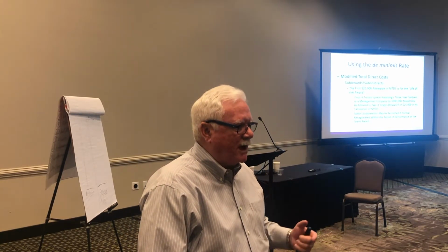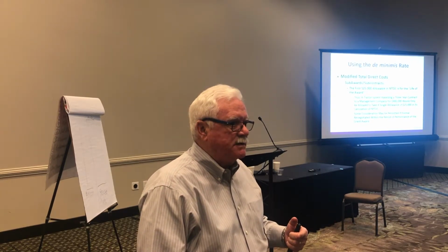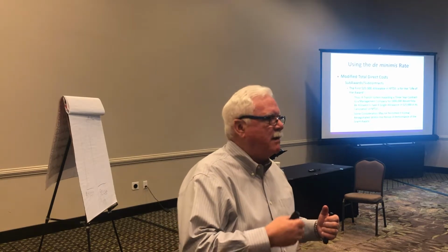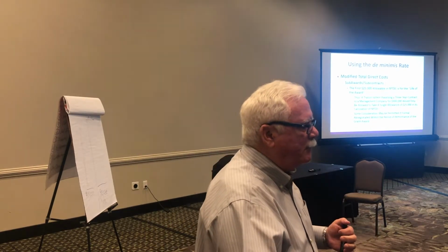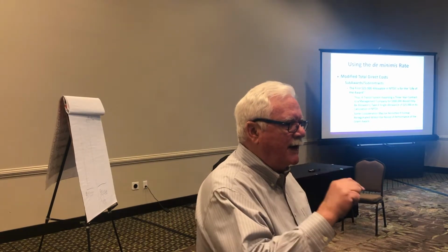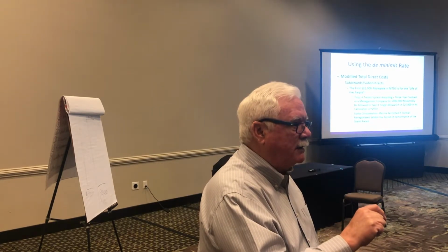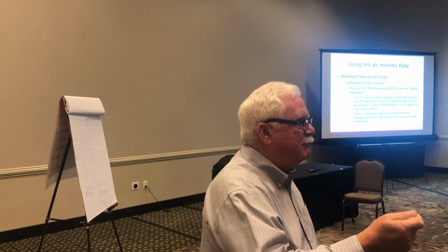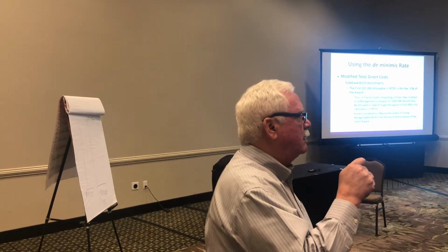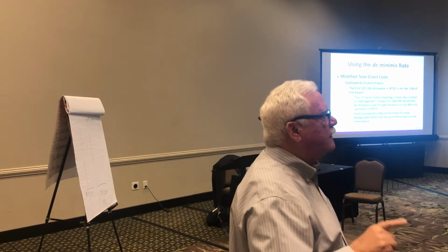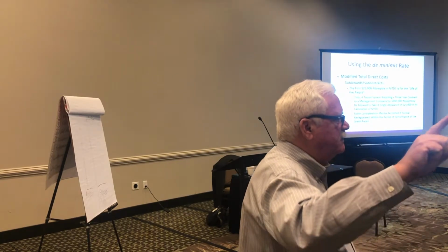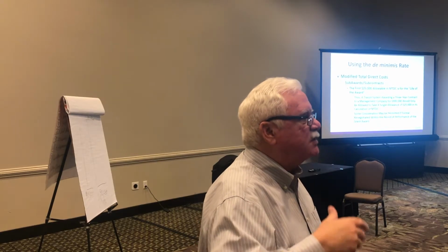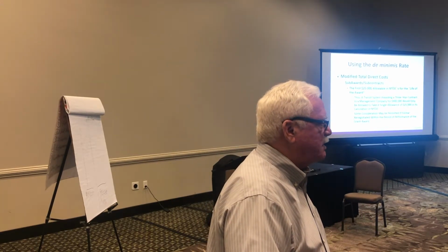They're holding out the possibility of subsequent years, but I'm not guaranteed that. That means any of my mobilization and preparation costs all have to be charged out in year 1, or I could lose my shirt on this contract, which means you'll be paying more for Transitions in year 1 than you would have been if you had said, we're bidding a 3-year period of performance plus 2 1-year renewal options.